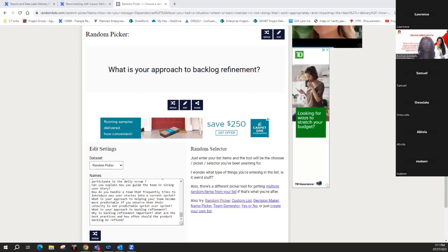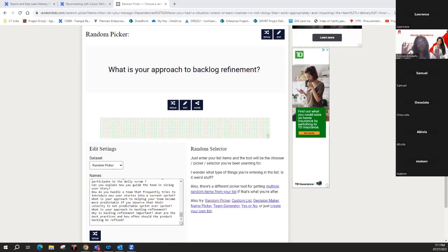So your approach to backlog refinement is prioritization, first of all. Then you're going to take each of the high priority user stories as a team and refine them. Should have user story written in very good, clear format. You're identifying risk and dependencies, like Lawrence said. You have your acceptance criteria well defined. You must also put an estimate, even if the estimate is a rough estimate.